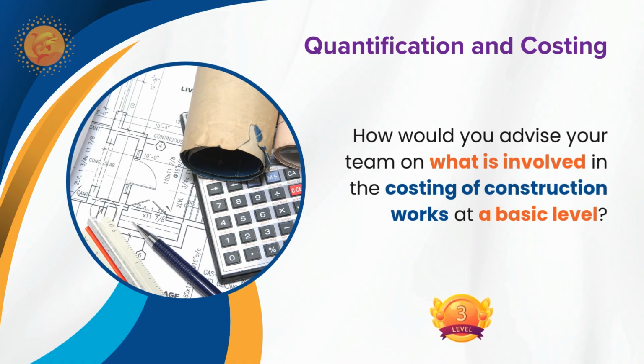In Oman, we are not following this BCIS or BMI, Laxton, Spons. We can't follow those things because they are not immediately usable data. You have to adjust them for time and location, currency and exchange, inflation, local availability.